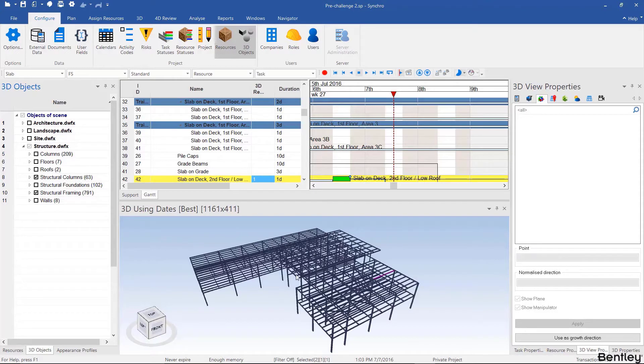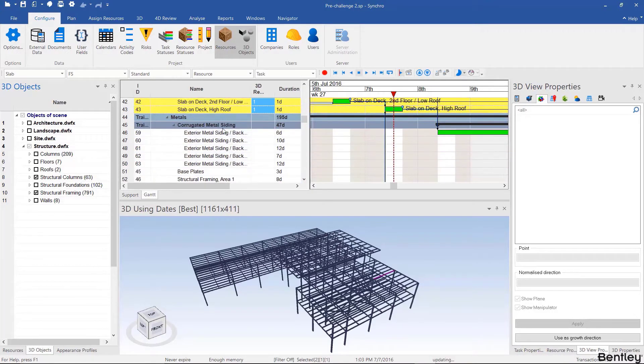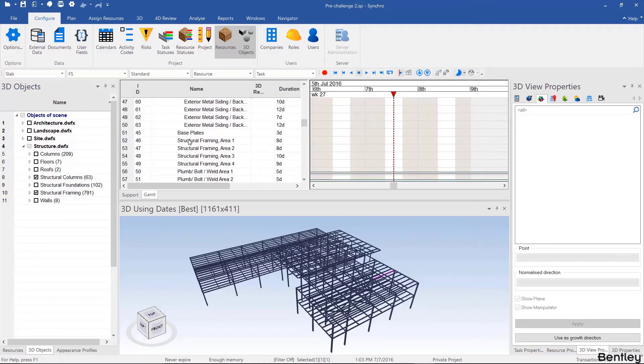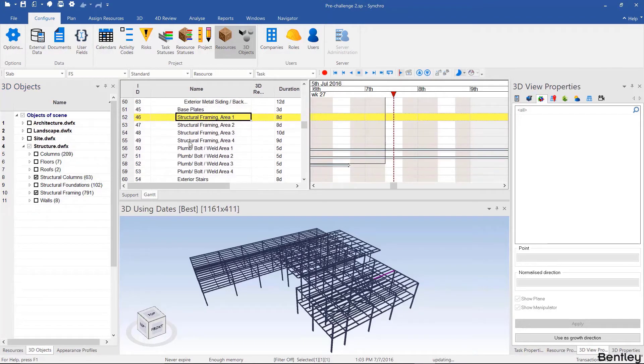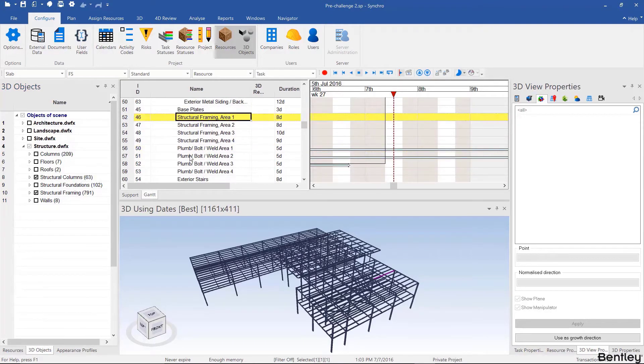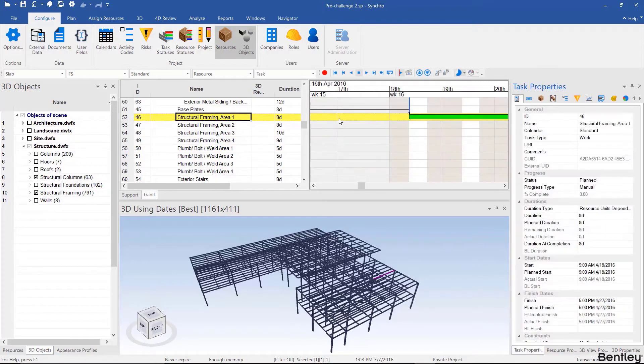Then I'm going to look at the relevant activities in the schedule. If we scroll under metals there's structural framing and plumb bolt weld for areas 1 through 4. I can double click here to center these activities in my Gantt chart.